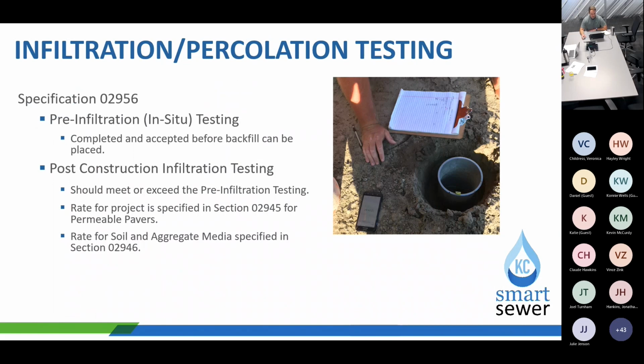Infiltration, percolation testing, very important. You do have pre-infiltration testing of the native soil within the basins. Make sure this is completed and accepted before any backfill can be placed in the basin, or if it's a paver area or what have you, as well as the post-construction infiltration testing. These rates should meet or exceed the rates of the pre-infiltration testing specified for permeable pavers in the 2945 GSI, and then also for soil and aggregate in the 2946.